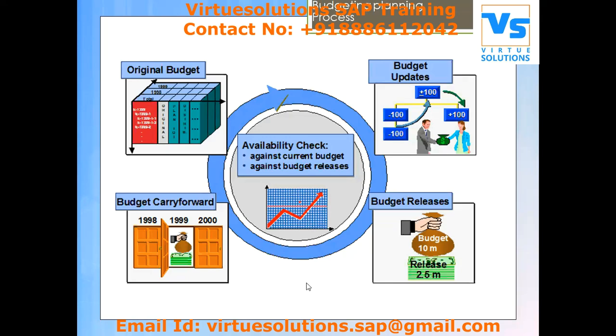That is under this budget management. If you want, you can carry forward those budgets. Suppose this year you got some budget, and maybe you have not utilized the entire budget. The remaining budget you can either transfer back to your organization, or you can carry it forward to the next financial year. That is up to the project managers, whether they want to keep those budgets or carry them forward to the next financial year.